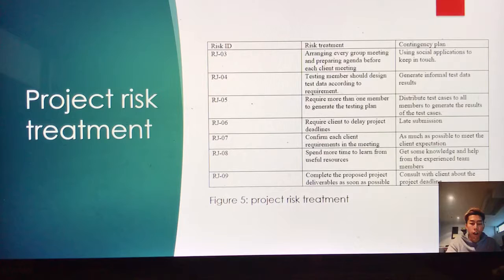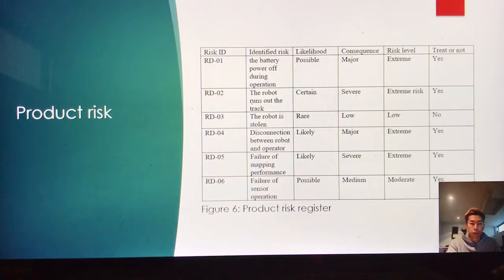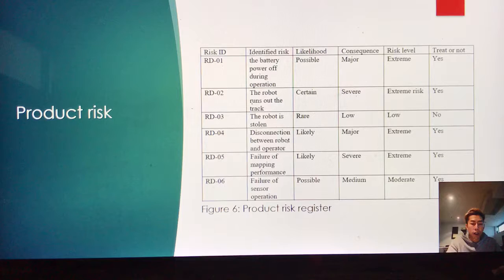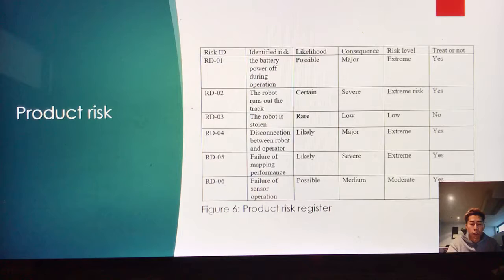In order to save time, risks of extremely low probability are not adjusted. The product risk table is the same as the project risk table. Both product risk and project risk each have more than 10 identified risk entries. All responsible persons are owners assigned to risks at different levels.